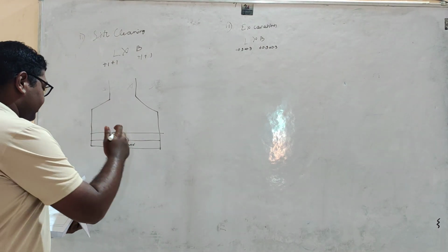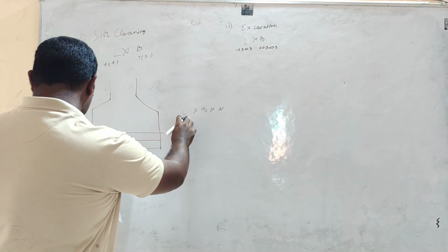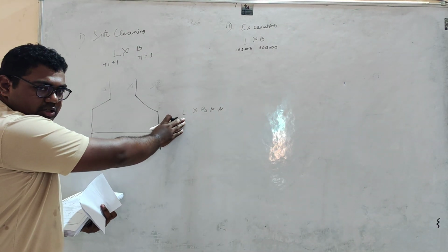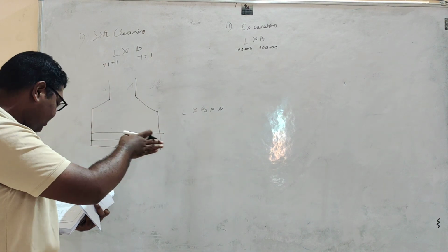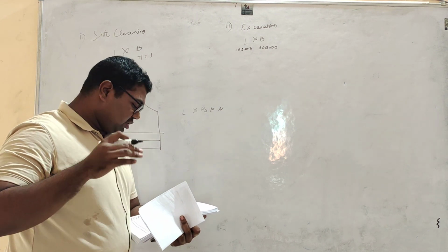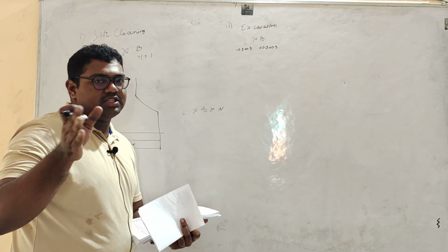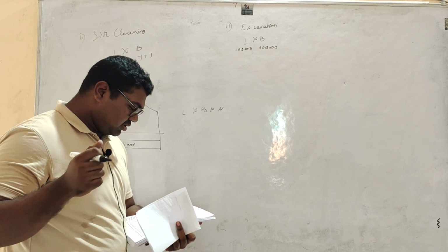Its formula is the same as that of volume. The length and breadth will be the same as that of the excavating length and breadth. But for height, we have to take 4 inches to 8 inches, that is 100 to 200 millimeters, as per the CPWD norms.